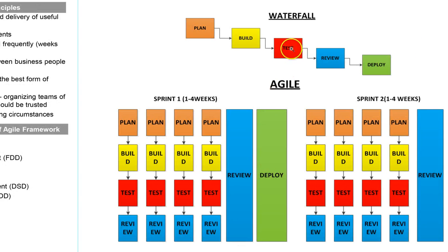So now, if you look over here in Waterfall, testing is done somewhere in the middle of the project. So if the project is 1 year long, the testing is done somewhere on month 7 or maybe month 6. But in Agile, testing is done at every sprint. So if this was a 1 year project and we have close to 36 some sprints, then every 3 to 4 weeks we will be doing testing. And if anything is wrong, then you're not wasting all the time before that.